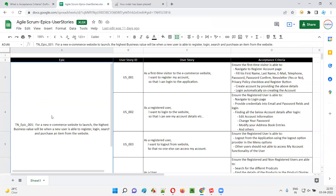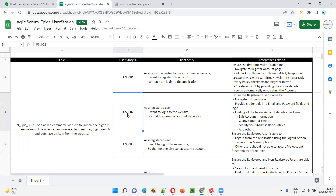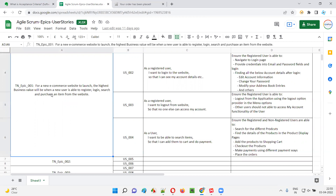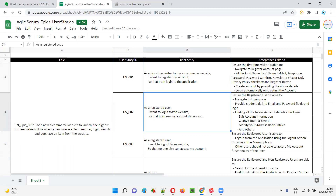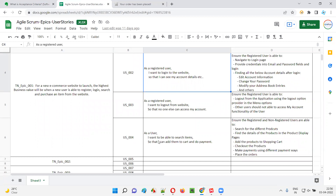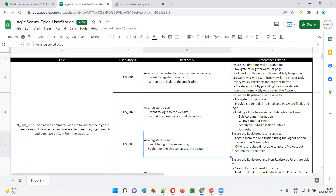This single higher level requirement covering creating an account, logging in, searching, and purchasing an item from the website is broken down into smaller chunks of requirements known as user stories — user story one, two, three, four. User stories will generally be in this format: 'As a something, I want to do something, so that something should happen.' The product owner will create these user stories, not the software tester.